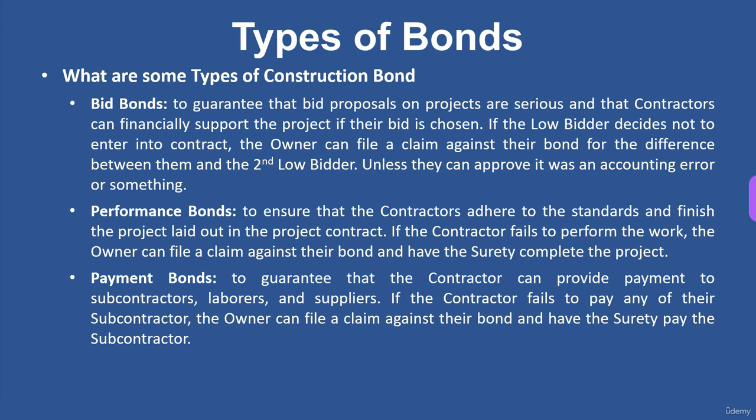On some of the state projects I've dealt with, there are laws that allow subcontractors to bypass the general contractor and file a direct payment claim with the owner. And that's happened too, where the owner would issue a check to the sub. And a lot of times they'll put the sub's name and the contractor's name on it, so they both have to sign it before it can be cashed. So that's another way of doing it to make sure that the subcontractor is getting paid,